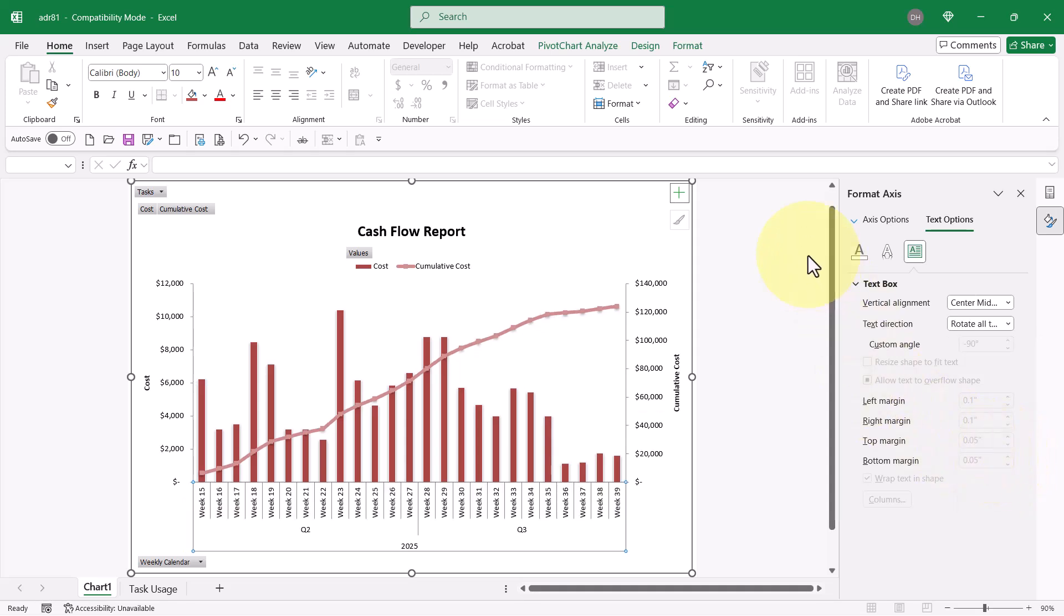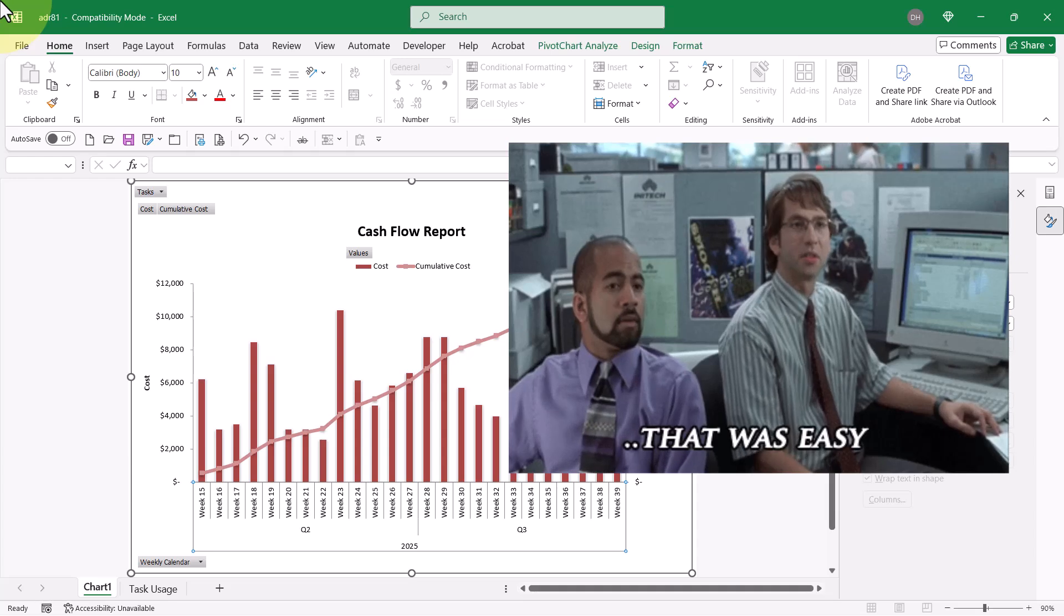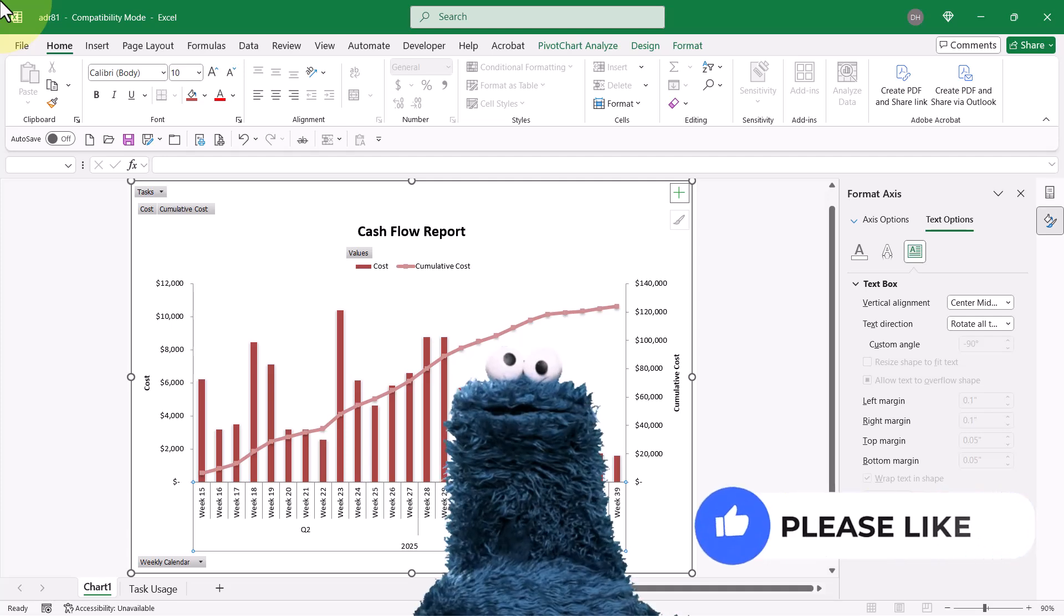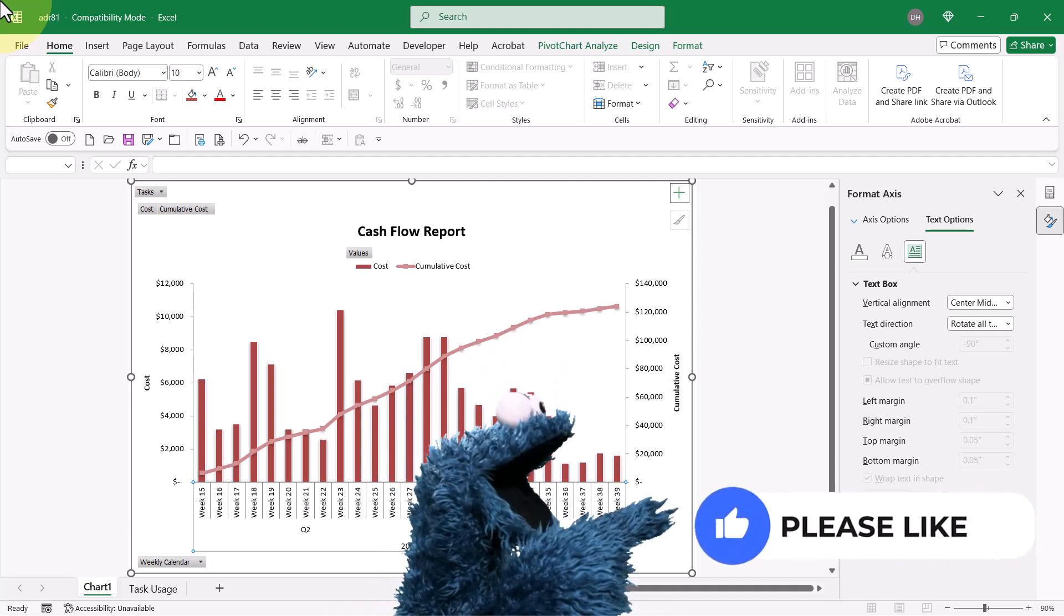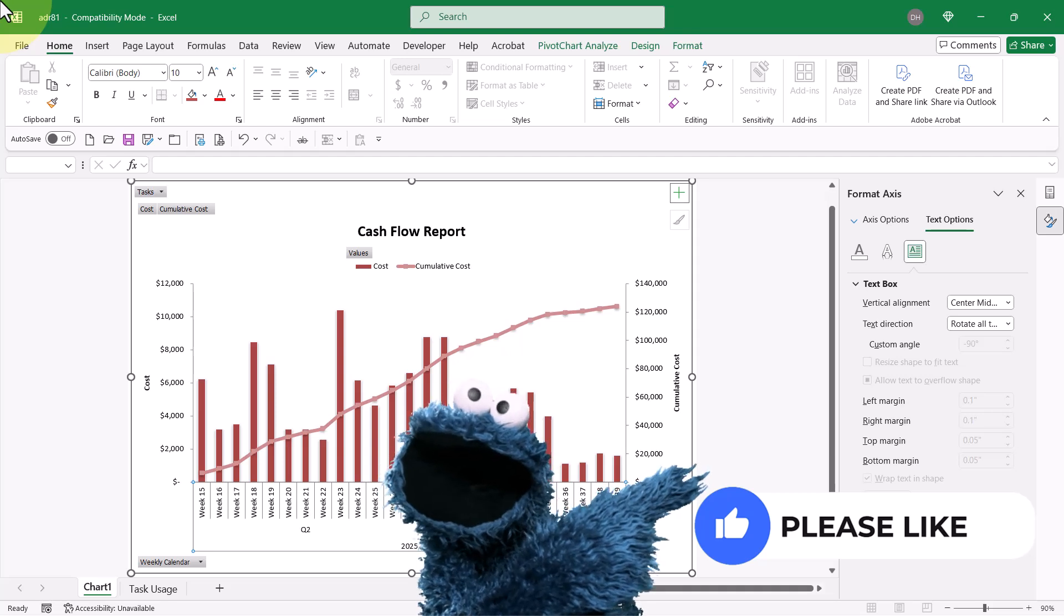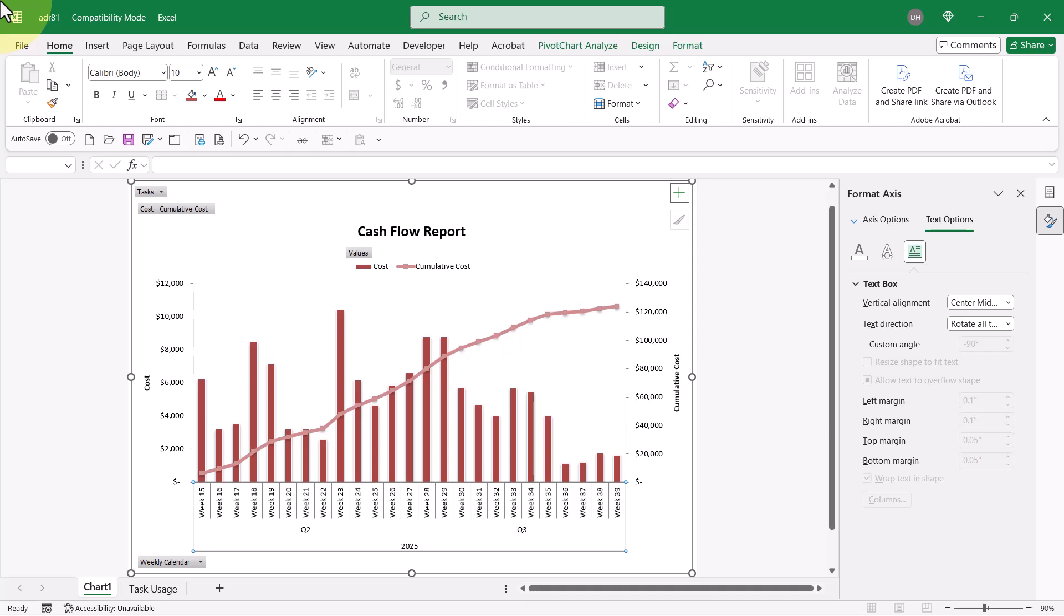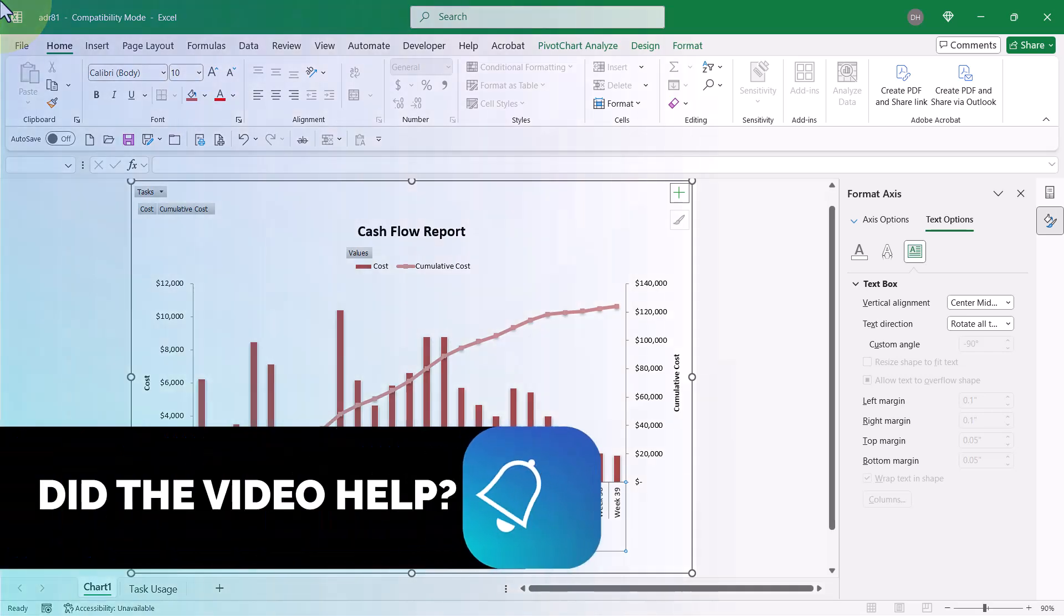Oh, nice. And there it is, an Excel visual report that shows the cash flow by week in my project with the cost per week as a column chart and the cumulative cost as a line chart.